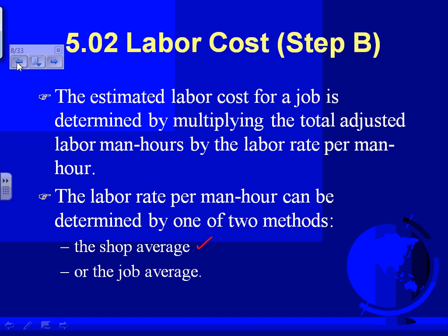See what they did? They added all the hours over 6 months that your crews worked on a project, and kept track of their hours. That's easy to keep track of, how much you paid them. You divided how many dollars you paid them by how many hours they billed you, and that will get you the 10.65. Is that low? Yeah, very low, extremely low.